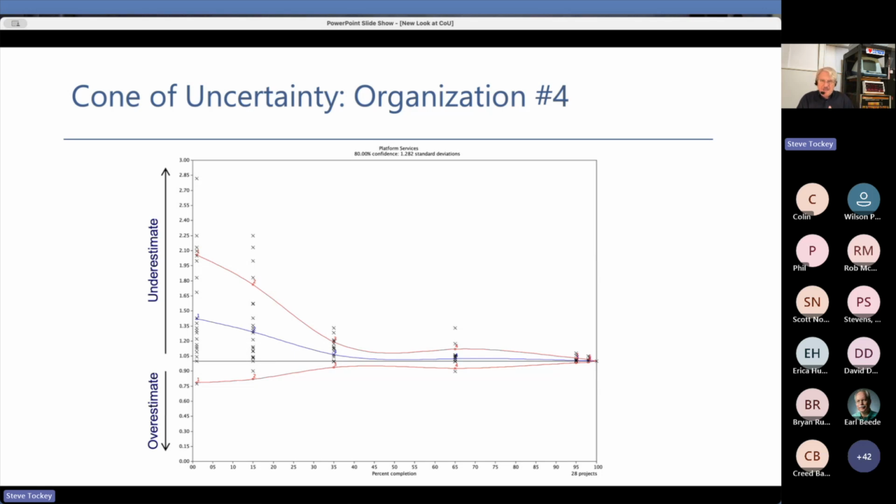Now, at the estimate 3 point in their development process, they shift the project from fixed scope to fixed schedule. Essentially, at that 35% of the way into the project point, they're saying, okay, we're going to declare our delivery date to be such and such a date. And from then on, what they're actually doing is managing the scope to meet the delivery date. So the important message here is that this is a view of the schedule uncertainty.